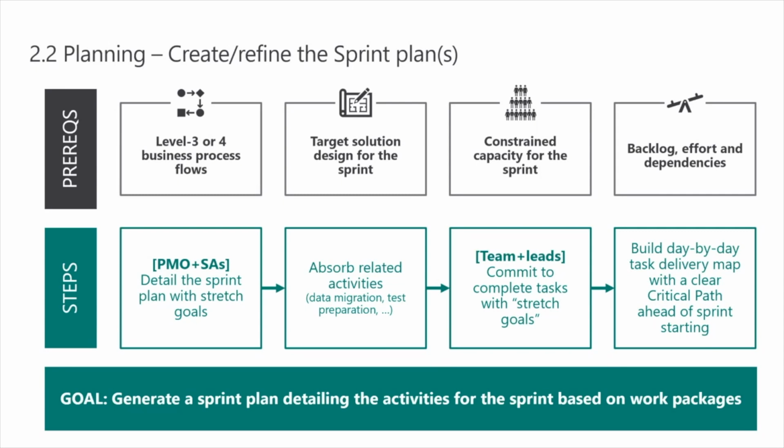This is planned simultaneously with those experts in the room. So you do a combined plan where you say, in order for my process to make sense, to validate that at the end of the sprint, I need the following data for it to be meaningful. And the data migration team essentially is then feeding the project team the data they require as you go through the project. It's not a big bang at the end where they say, right, we finished with data migration now, right? It's an incremental delivery.